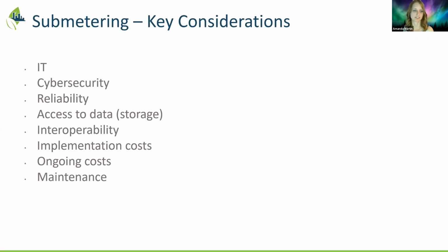And the last bit of advice I would say is engage IT as early as possible. When you know you need a meter is a good starting point, because sometimes they need quite a bit of lead time. There could be extra security assessments. They could have staffing shortages. So it's good to engage them early and help pinpoint where the locations are going to be and how many meters we're going to need, so we can run the cables and make sure we have the data available before, or at least when we need it.